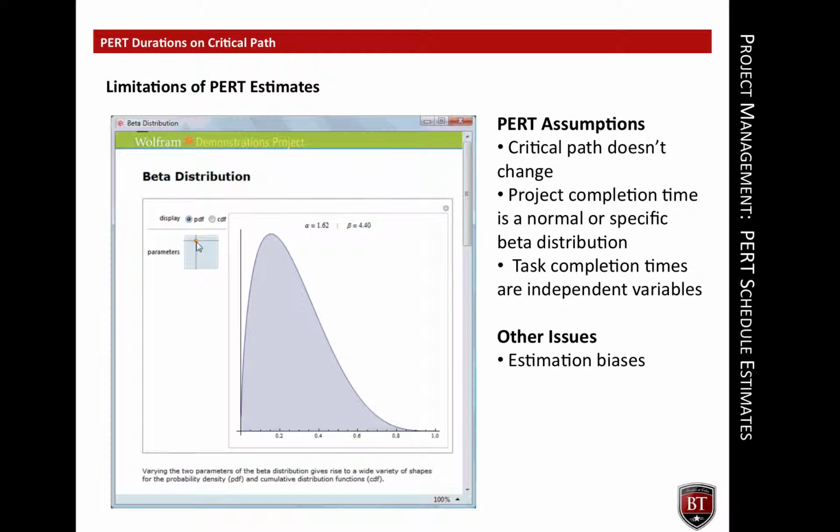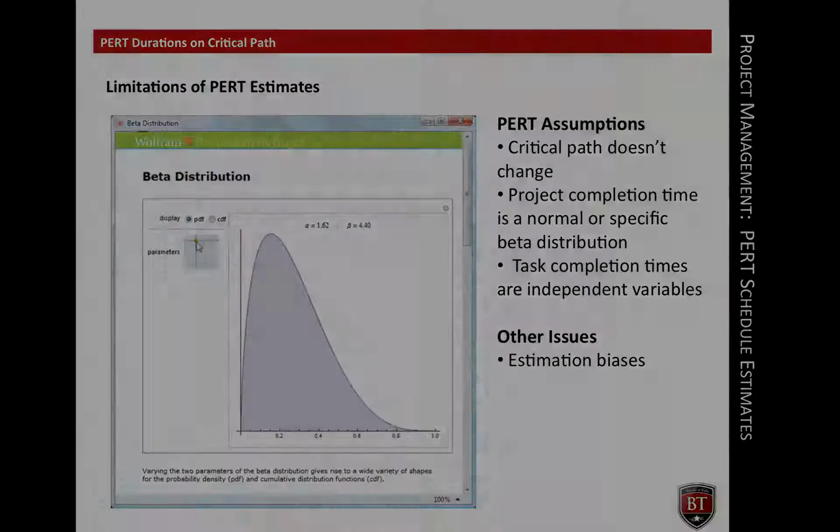You don't need to understand the math to understand the problem. Remember right and left skewed estimates? If the 3-point estimates are skewed differently than the 3 exact curves, the PERT methods don't fit. This slide shows one of the 3 distribution curves that fit the PERT method. Notice that the area under the curve is slightly right skewed. There is more area to the right of the median than there is to the left of the median.